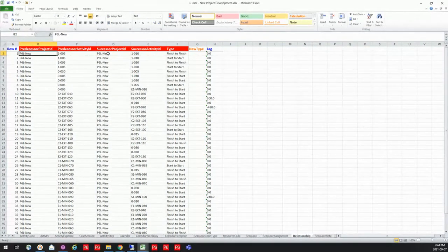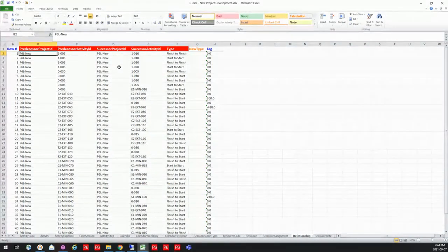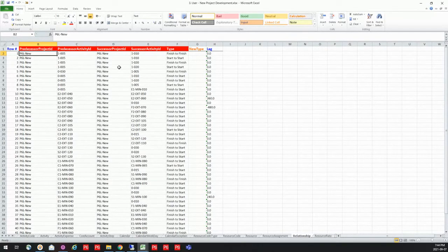And in a lot of cases, when we have people that are bringing in, say, contractor progress, and they're bringing in those schedules, what they do is they use P6-Loader to reattach those milestones or those cross-project relationships every time they bring in that new updated schedule. So this is a really easy way that you can update those cross-project relationships there.